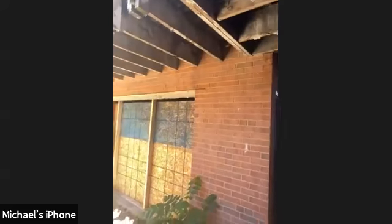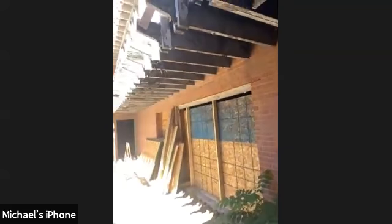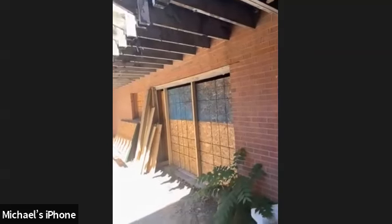So all those balcony joists, are they coming through the wall, or how are they tied into those walls? Yeah, I think they're cantilevered, aren't they? So are we going to reuse those, or put anything on those, or are we sistering them, or what's happening there? We're going to attach to the existing structural wall is what the new structural drawings show. Okay. So we're effectively taking those down and replacing them? Correct. Yeah, with all new. Okay.